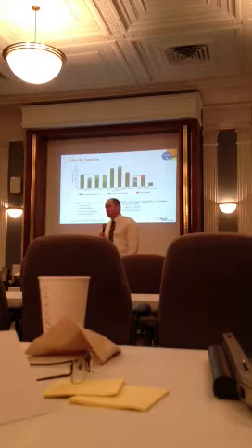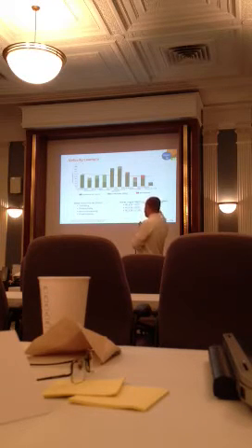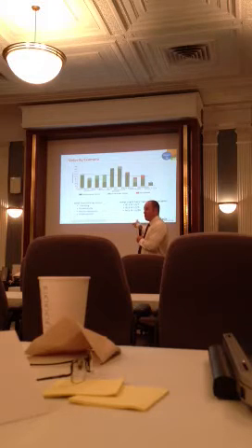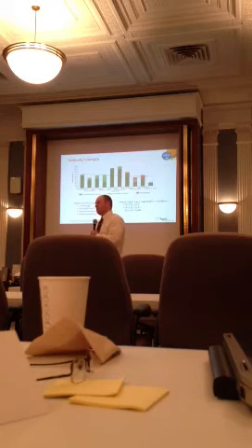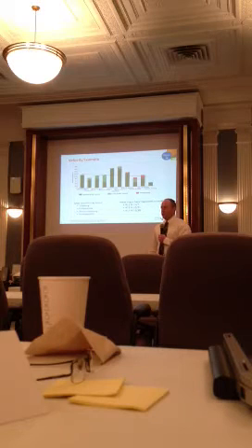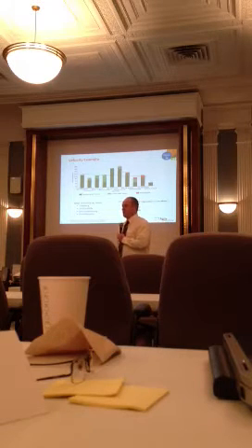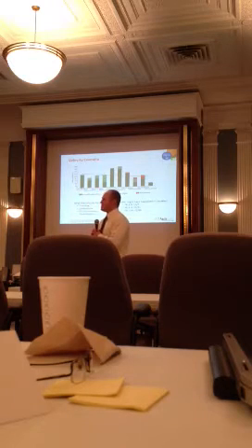I was trying to figure out why it wasn't light green. Why is it not light green? Because as of the time I pulled this report on January 3rd, it still hadn't been accepted. It was still open. So if you'd gotten to it like next month or something, it would have been light green, not red. Red turns into light green once that work gets accepted.